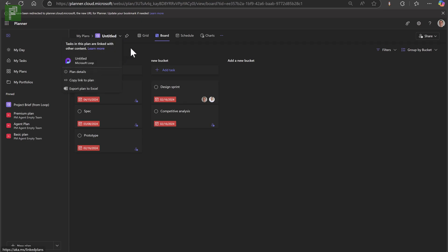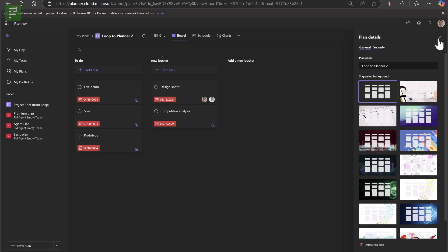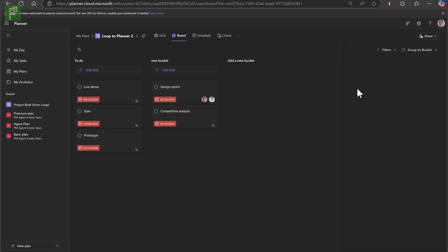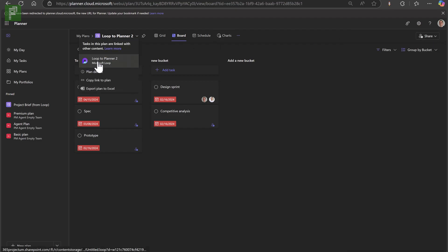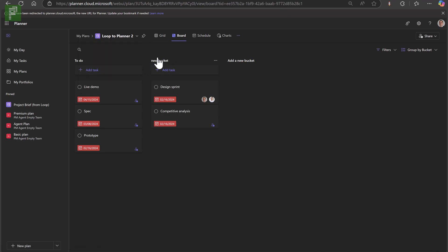This is an untitled plan, so let's get the plan details and give it a good name: Loop to Planner 2. Now this Loop to Planner 2 is available, but our last video ended very abruptly because this Loop to Planner looks different — it has a different icon. If I hover over it, you'll see that it is a Microsoft Loop sourced plan. That means it has a different construct and we have limited functionality. One of the things that's missing is the ability to use premium views — we don't have the option to add a timeline, people, assignments, or anything else from our premium set.